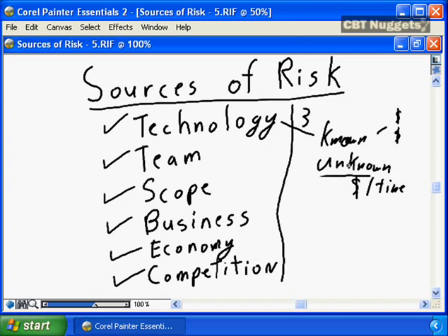and the unknown risks. A key component when you're dealing with risk management is not to confuse the specific allocations you've made for known. You allocated 5 days and $5,000 of specific risk management funding to deal with team training. Do not consume that allocation for unknown risks.